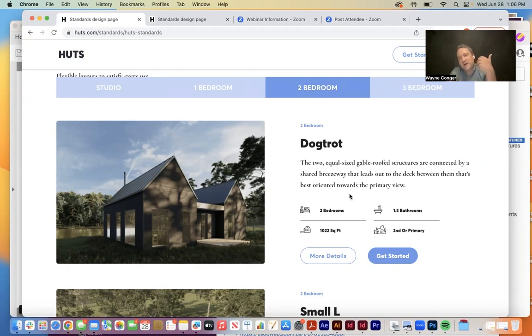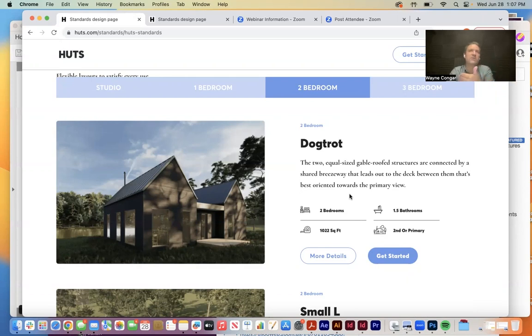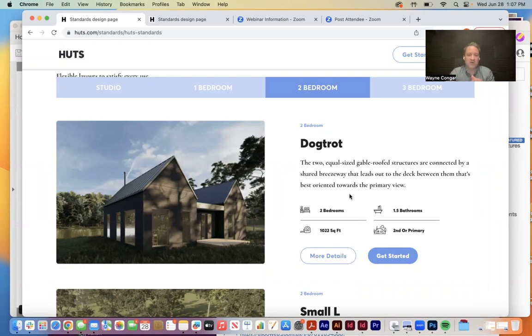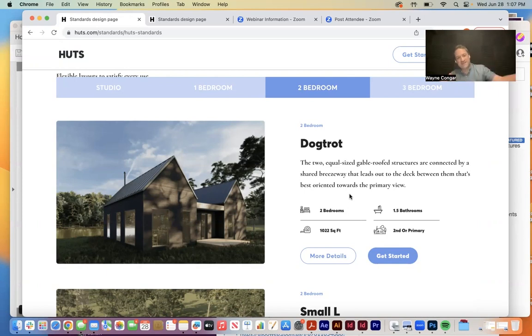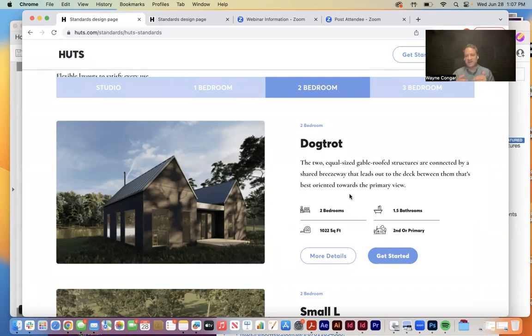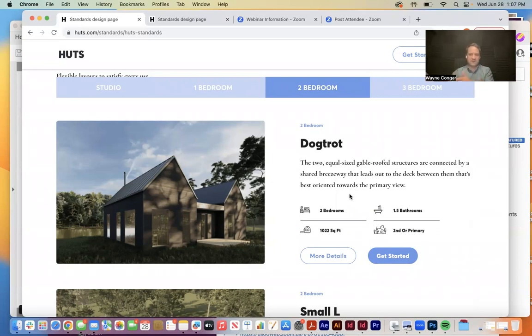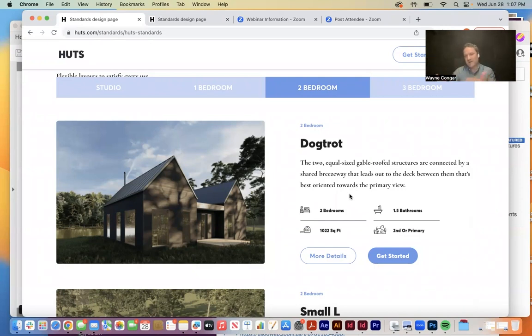In our case, our standards are a way for us to not start from a blank page and instead put our clients in the editor's seat where they're starting from something pretty close to what they have in mind and sort of push and pull it. And then at the same time, a spot where we're able to pretty accurately estimate what the pricing will be because we've developed the product so deeply. And instead of being told by the contractor what the costs will be, we often know up front and are able to help through this modification process. Our clients make informed decisions on how certain modifications are not just compelling on the design side, but what the ramifications are on the construction budget side.